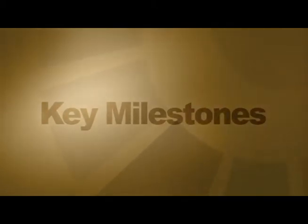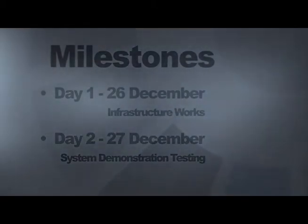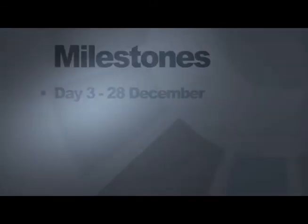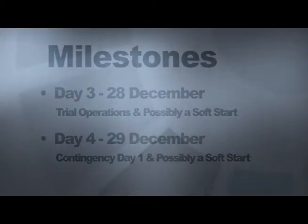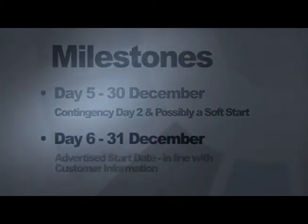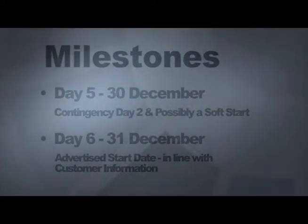There are a number of planned key milestones that will take place within Phase 2. These are Day 1, 26th of December, Infrastructure Works. Day 2, 27th of December, System Demonstration Testing. Day 3, 28th of December, trial operations and possibly a soft start. Day 4, 29th of December, contingency day 1 and possibly a soft start. Day 5, 30th of December, contingency day 2 and possibly a soft start. Day 6, 31st of December, advertised start date in line with customer information.